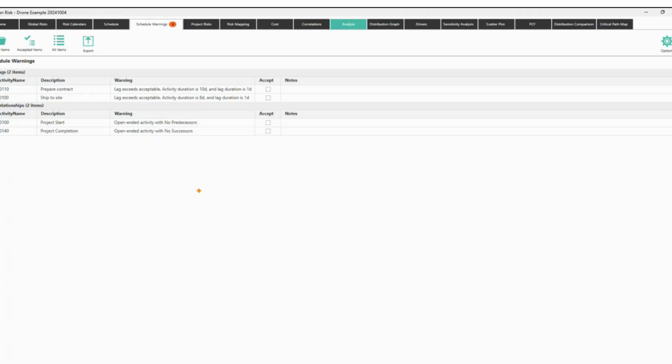Remember, if we have our tasks here, one after the other, like this, and we're going to say, well, this task is also a distribution, meaning that we're going to add uncertainty to each one of them. Remember, the natural oscillation means that these tasks can extend, they can stretch, right?